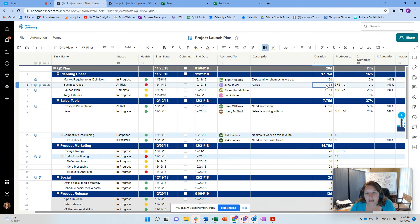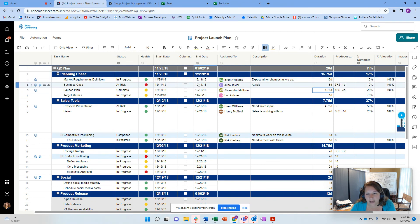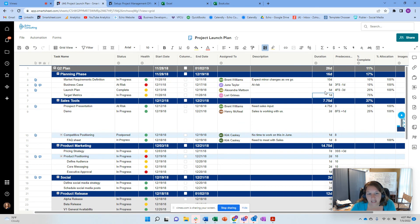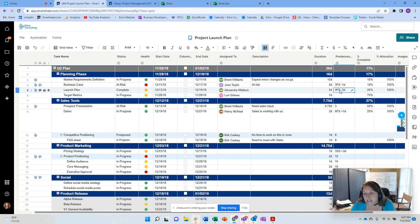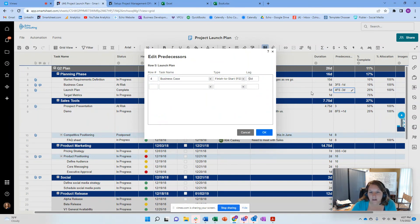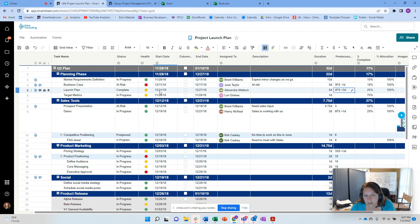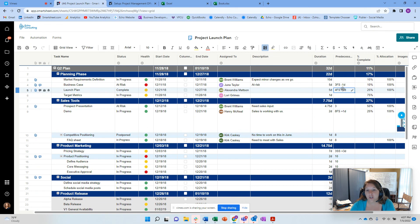So here, for example, if I make this five dates and everything like that, like it updates these dates back and forth. So if I update this, I'm going to say this takes five days. That's going to update this task. And these minuses, these are a little bit harder to understand, but this is a lag. So this is minus three days. You can also add a lag, which is add three days to this. So this cannot start until this finishes plus an additional three days. So it can give you some buffer time. So again, top three things I want to start with. I'm going to do some more videos on this, but why is Smartsheet and Excel different?